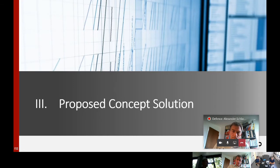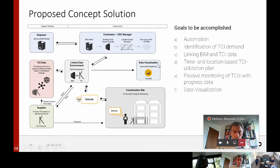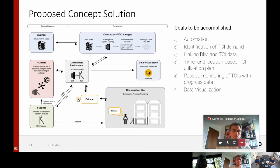As the research design is presented, I would like to continue with the concept solution. For this concept solution, I first derived goals which the solution has to accomplish from literature and the state-of-the-art review. The solution shall function automatically, identify the TCI demand of the building model, link the BIM data — which is the building model and the location-based schedule — to the TCI demand. It shall also develop a time and location-based plan, enable passive monitoring with progress information from the schedule, and visualize the data for the stakeholder needs.